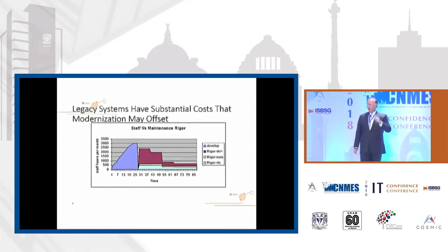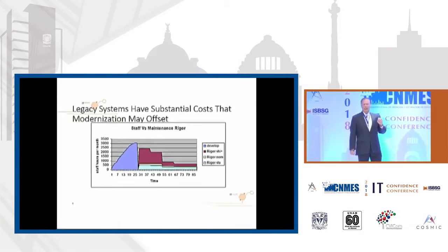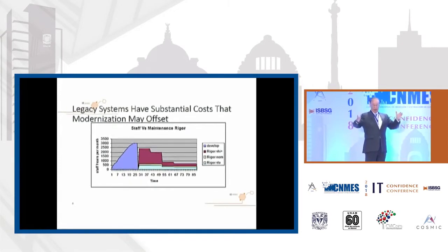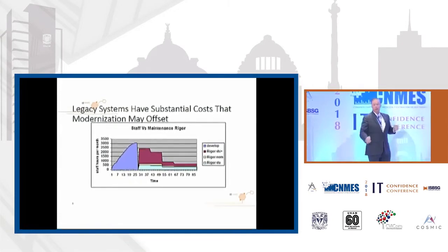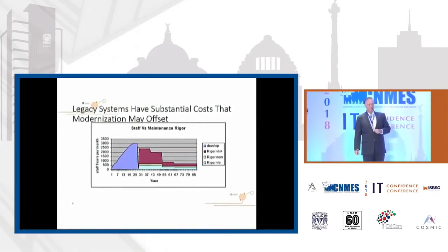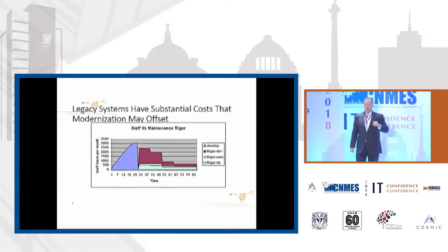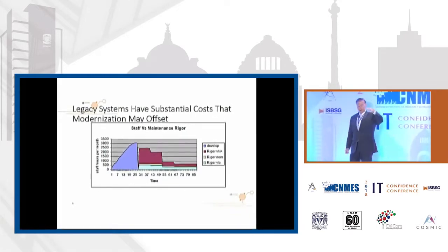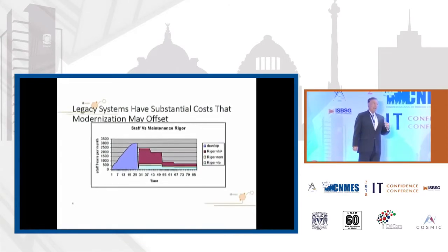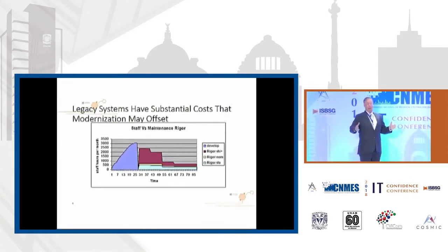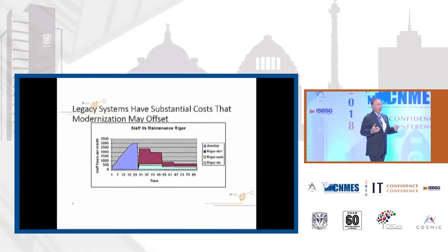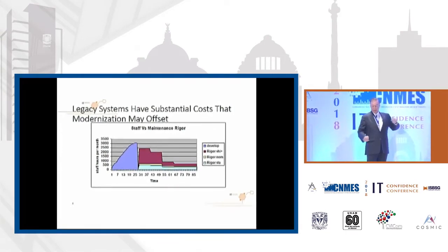And here's the bottom line of maintenance. Maintenance is a level of effort activity. That means if you say, for example, our SEER model might say you need 12 people to maintain this. The project manager might say, "Hey, we're only putting 2 on, deal with it." Well, okay, put 2 on. What happens though, the cost of maintenance goes down, the technical debt goes up. And in many cases, the software ends up being obsolete and you have to throw it away and do it over again, back to the modernization, because they didn't spend the time appropriately on maintenance. Next slide, please.